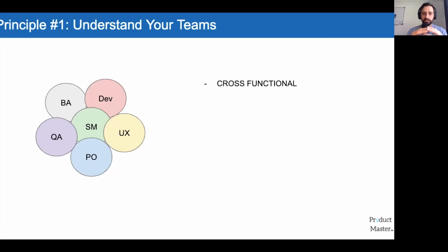It's important to make sure that your teams are cross-functional. In this example, we have a very cross-functional team, with different skills coming together that are going to complement the whole product in totality. So make sure your teams are cross-functional, with more than one skill set on hand. Keep your team small. The bigger your team is, the harder it is to manage. People hide. That doesn't mean one big product only has a small team; you can have multiple teams working on one product, but you want to keep each actual team small.